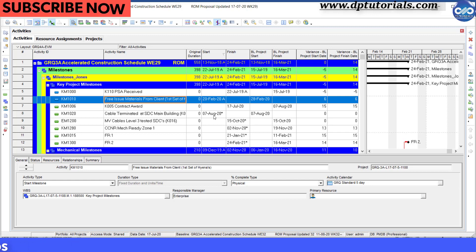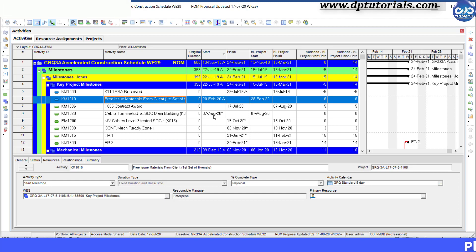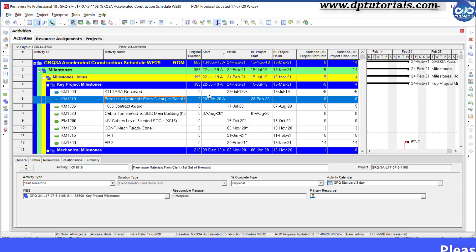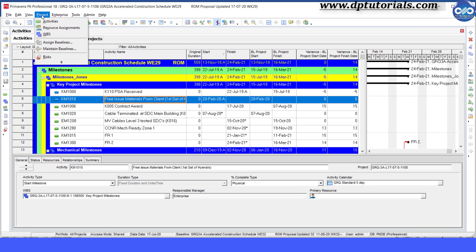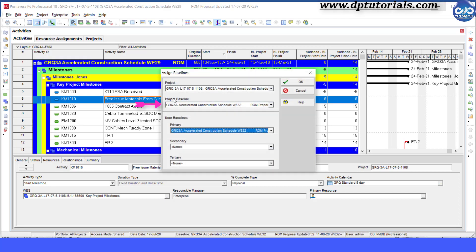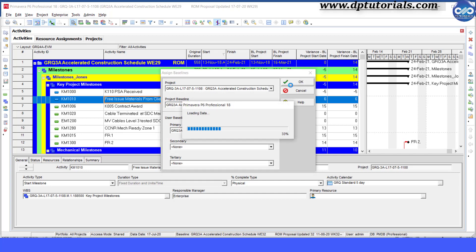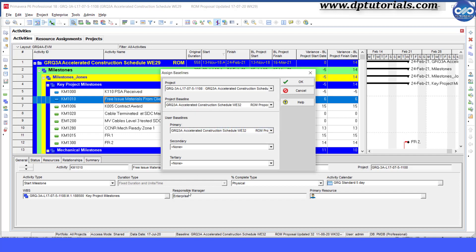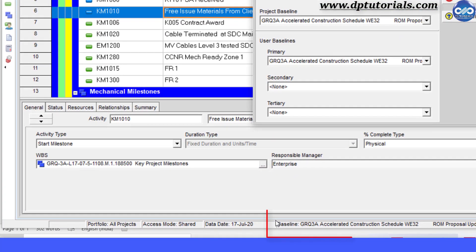In this example that I will be using in this video, when I go to the Projects tab and click on Assign Baselines, you can view a baseline attached under this project baseline. One more way to check whether your schedule has the baseline assigned or not is by viewing the information bar right at the bottom here.